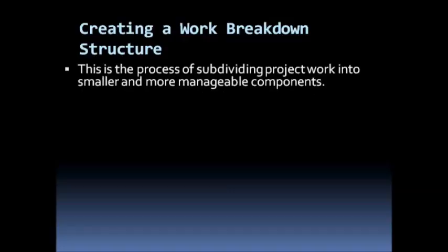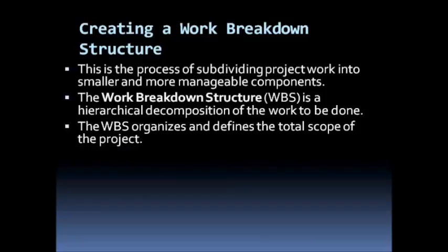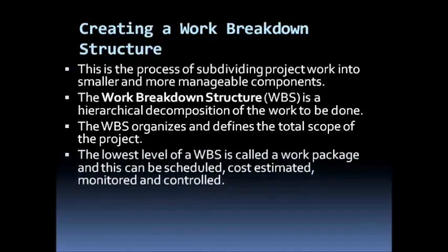This is the process of subdividing the project work into smaller and more manageable components. The WBS, which is short for work breakdown structure, is a hierarchical decomposition of the work to be done. It will organize and define the total scope of the project, and it breaks down the total scope into lower levels, and these lowest levels of the WBS are referred to as work packages.